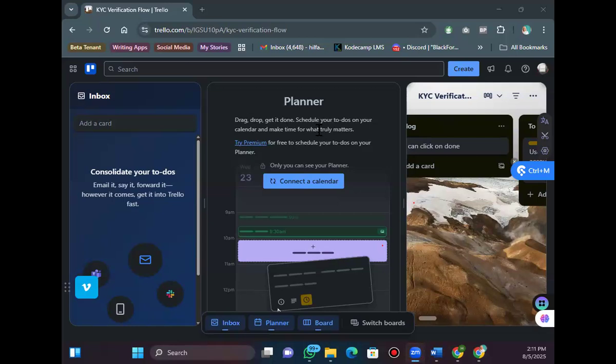Okay, that is great. So what you do basically, let me just recap, is you sign up, you create your workspace, you create a focus board for your project, you add lists that reflect your team's workflow, you add cards as your actual tasks, and then you fill out the necessary information.